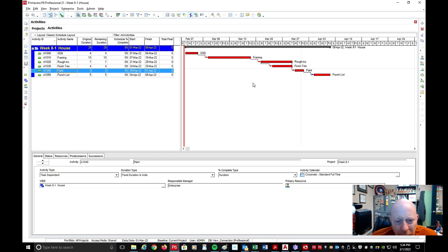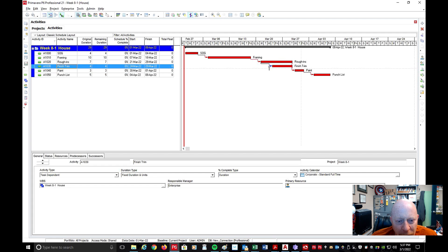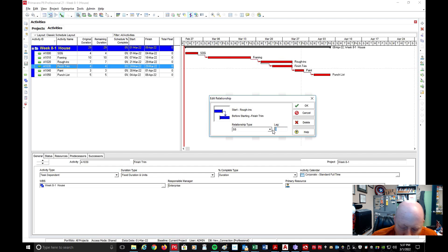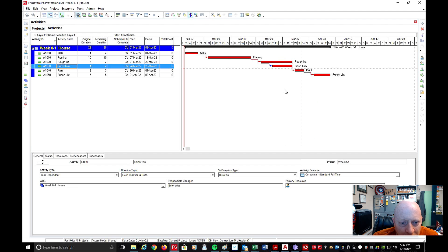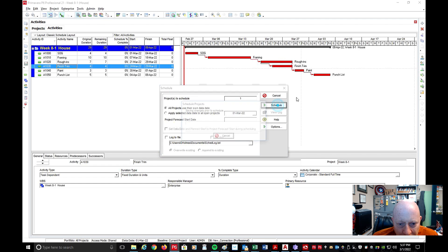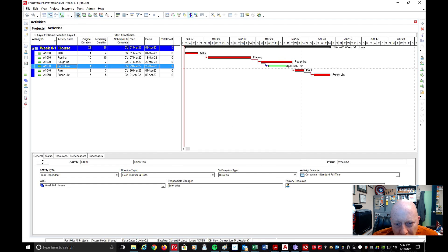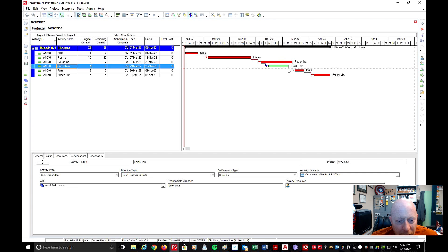Now every activity is a critical activity. But if I change Finish Trim's lag to two days and hit OK, it will probably turn that activity green. The reason is Finish Trim now gets done before the Rough-Ins do, so it's not critical — I still have one float day there. The difference between the end of Rough-Ins and the end of Finish Trim is one day. At the end of Rough-Ins, that's when I start to Paint, so Finish Trim is no longer a critical activity.